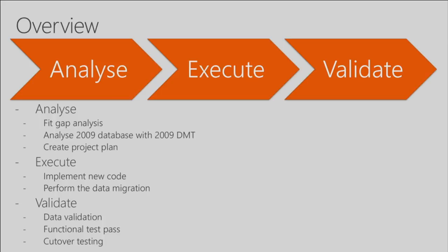We shipped it primarily targeting 2012, but it's such a generic workspace, you can actually customize it and add 2009-specific tasks in that workspace, right? So you can use it as a placeholder for a runbook. You can create tasks to say, after the migration, please go check opening balance for all my financial accounts, right? Or make sure after migration, the customer counts in 2009 match the customer counts in D365.